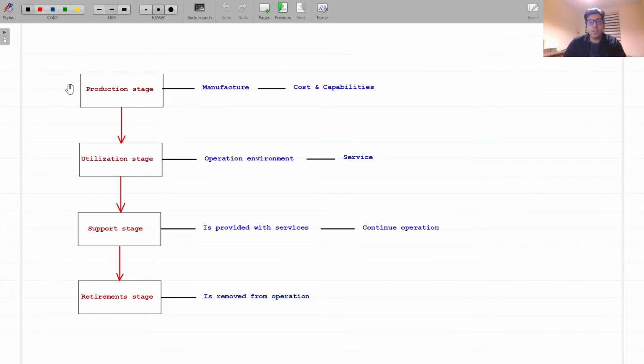The production stage is where the system is produced or manufactured. Product modifications may be required to resolve production problems, to reduce production costs, or to enhance product or system capabilities. Any of these may influence system requirements and may require system re-verification and revalidation. All such changes require SE assessment before changes are approved.